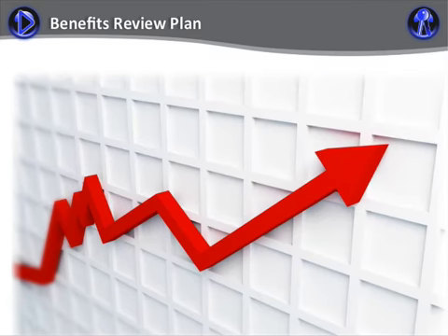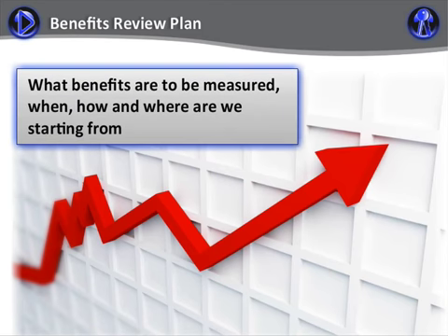The benefits review plan includes information on what benefits are covered within the scope of the document. That is to say, the benefits that can be attributed to our project. It states how to measure the benefits, what resources are needed to carry out this work, and when it is sensible and appropriate to do so. So, if we were hoping for an increase in profit within 6 months of implementation, then 6 months after implementation would be a sensible point to plan for a post-project review to check.